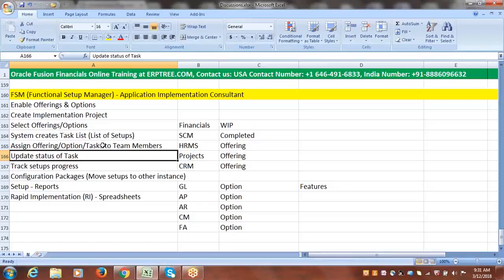When we are creating the project, we have to assign the project to one of the users. Ideally, if you create a project manager within the instance, and the project manager is going to have access to the instance and has an idea about these applications, you may assign the project to them, or else you can assign it to any one of the consultants. At project creation time, the assignment is mandatory. Basically, from whichever user you create that project, the project will get associated with that user only. Later you can override.